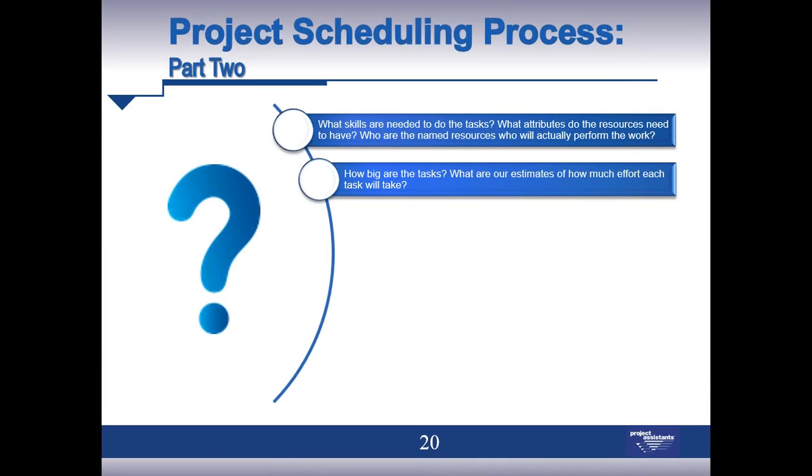Our best practice here is to have the person doing the task estimate it, right? And based on your experience, you can ask the right questions to make sure that person is giving you a practical, realistic estimate. And obviously, if they have more experience on their job, the estimates should be more accurate as they gain that knowledge.